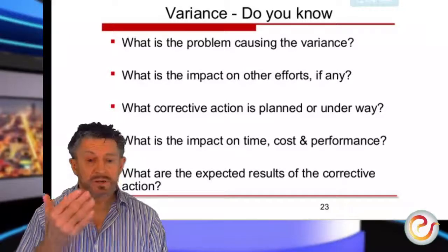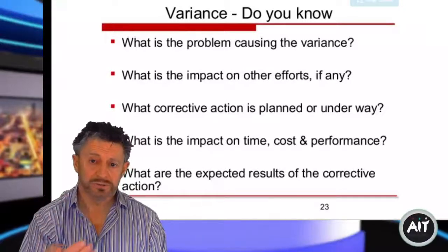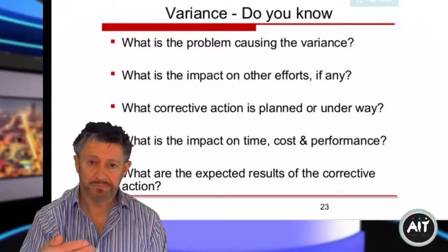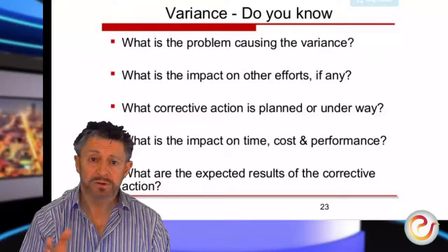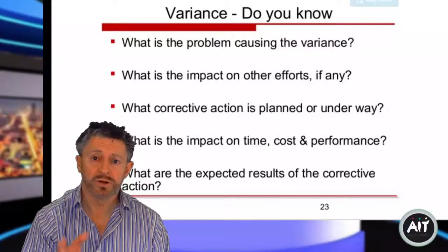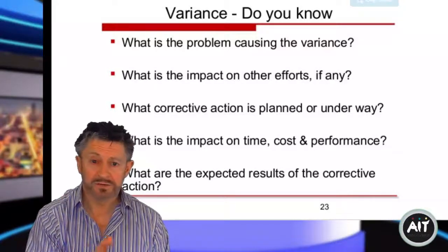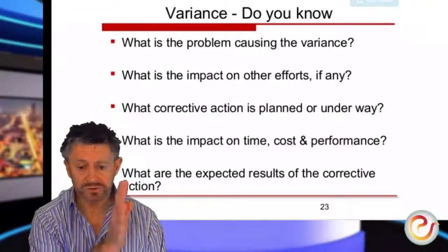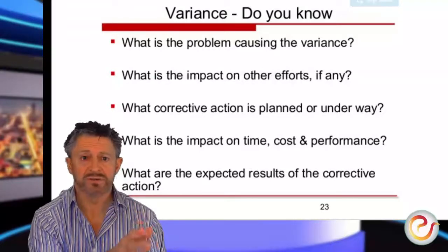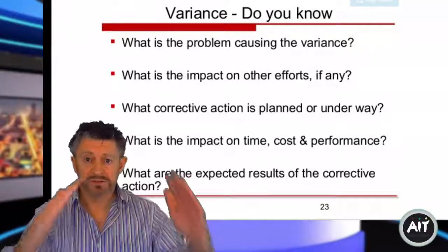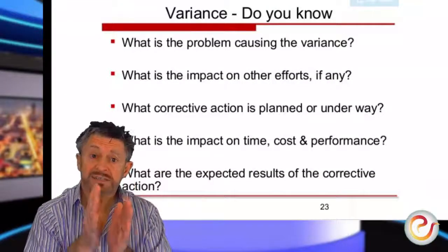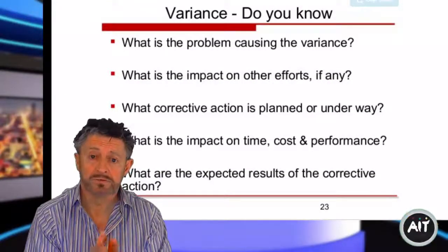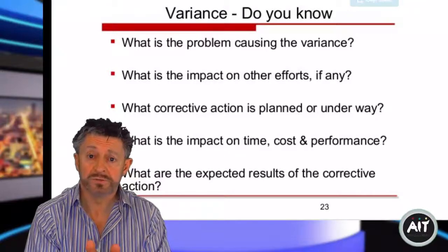Let's just say that if the walls weren't built in your house by week 7, and you have the roofing people coming in on Monday morning of week 7. These guys arrive on site, and the walls aren't complete. There's still another 2 days work to finish the last parts of the walls. Therefore, you have those guys standing around doing nothing for 2 days, the roofers.